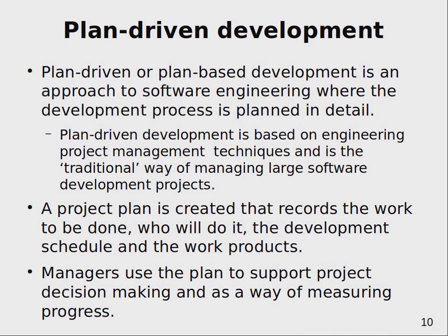If you consider something like iterative approaches and incremental delivery approaches, the end of the project may be more blurry than the beginning, but in general you have to create a plan with equal level of details for the entire time of this project, because otherwise you are risking that closer to the end of the project you will be under bigger and bigger stress that you will not be able to deliver these things at the planned milestones because you were too optimistic.